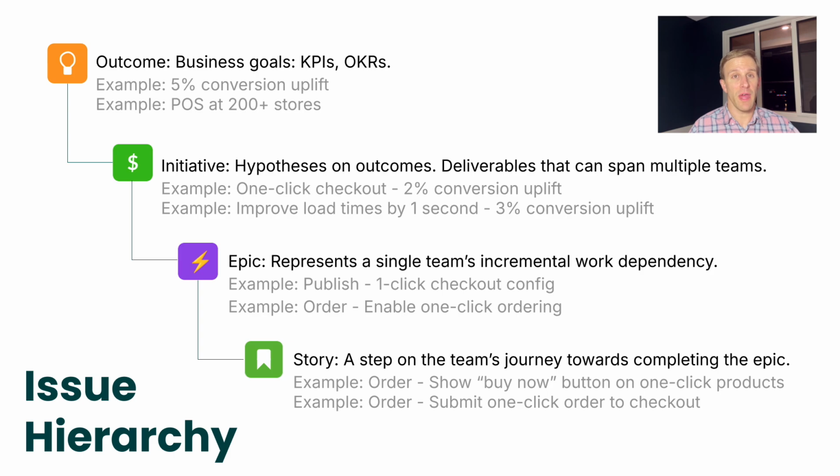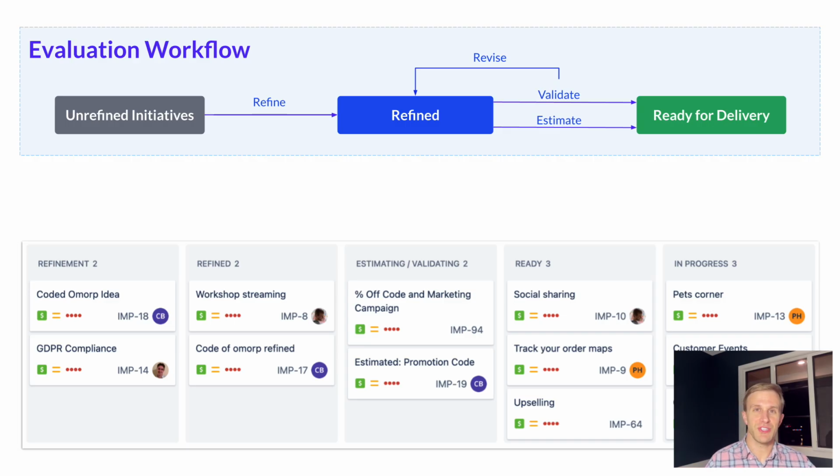For multi-team planning, when we're using Jira, we create new ideas as initiatives. Initiatives can have multiple epics across multiple teams. You'll notice initiatives usually roll up to a target outcome too. To manage the process in Jira, we use an initiative exploration board that reflects our exploration workflow. So let's see how we can use that board and how it adds clarity to the exploration process.